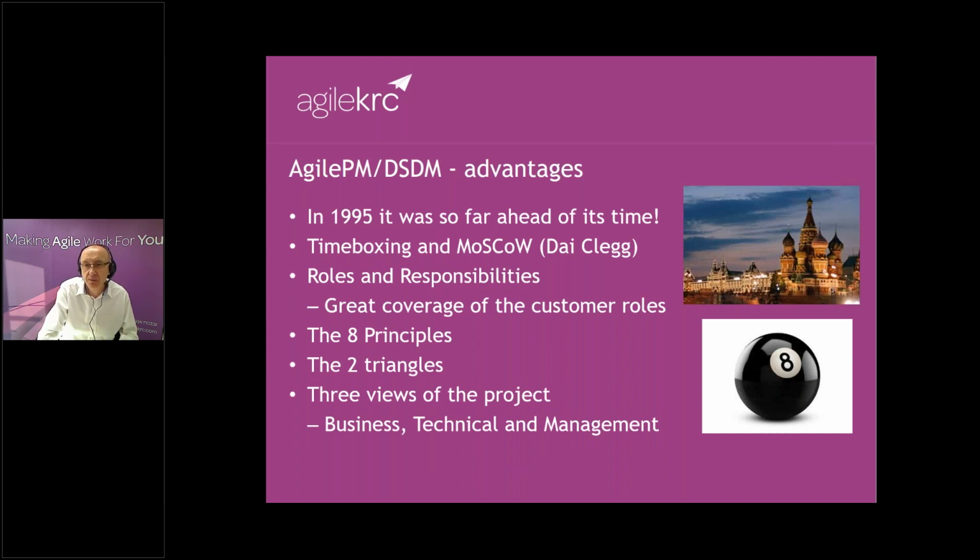One thing I particularly like, which I think the current technical director put in, is splitting out the project into what I would call three sort of views. There's a business angle, a technical angle, and a management angle. And by management, I mean project management. I don't mean the management. Separating out your documentation and your roles into those makes things a lot easier for things like sign off, who the audience is. You're trying to bring those three things together on a project, and splitting them out and making them much clearer, I think, is really good. You've got someone who wants it, someone who's building it, and someone who's going to make the thing happen.